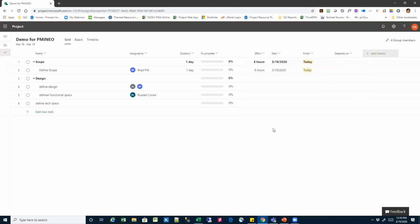So, dependencies. This is where this tool shines, because Planner already has all this flexibility of assigning resources, but the dependencies, the effort estimates, the work, the roll-ups, the work breakdown structure, that's where this starts. Underlying this is the same scheduling engine that is powering Project Online. It's not up to par with everything that the previous scheduling engine does, but they are modeling based on the same thing. From a calendar standpoint, there are 8 hours, so you can assign a start and finish date. You can say the duration is 2 weeks, or 1 day or 10 days, whatever. There is some discussion going on with the task types and effort-driven versus not effort-driven. Again, remember, this is for people managing projects that are not very heavily schedule intensive.